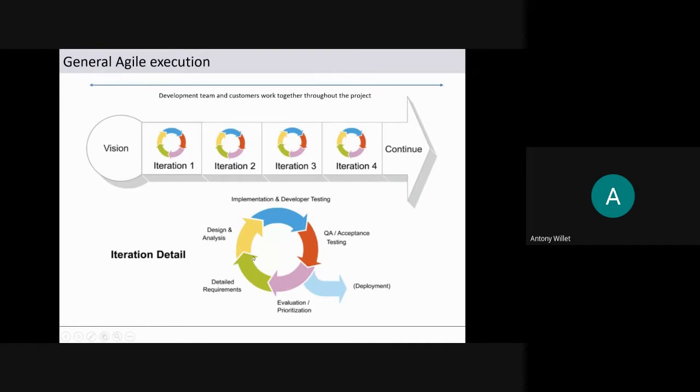Okay. Let us say if a website is developed, a job website is developed, then a login screen or a login module they are developing in iteration one. For that login module, the rough set of requirements is analyzed, and it is designed, whatever the minimal design that is required, that is done only for that particular module, that is developed and tested, and maybe the acceptance testing, if it is applicable, then that is also done. Then that software is deployed on the website and checked if it is working fine or not in iteration one. Okay, only one module, which is a login module.